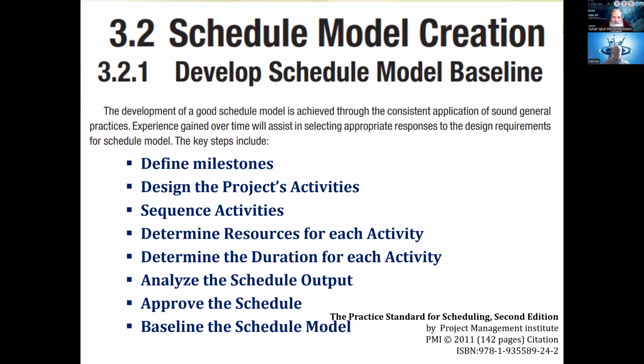But remember, creating a sequence of activities will only result in a network diagram without any durations, right? Yes, sir. A network diagram does not have a critical path calculated right there. We just have a sequence of activities, the relationships, the sequence, what comes after it, the predecessor, the successor.